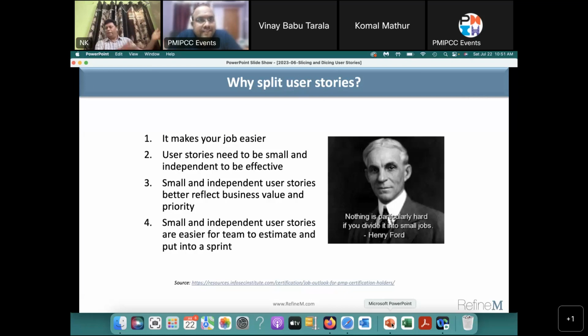So I'll say, okay, start with that and then build other things into that. So simply, if you have a story that takes 5 story points, meaning 5 days, and if you have 10 days of sprint, that is what the maximum size of the user story should be. So every user story in the sprint should be less than or equal to that. Then you will be able to finish what you pick. Otherwise, if it is more than 5 for this regular team size of 8 to 10 people. If you have more people, probably you can take larger stories in the sprint, right?